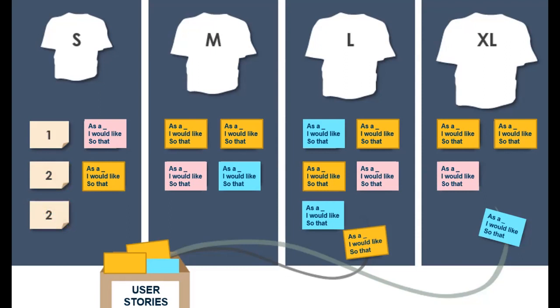We take them away from view just so that we can focus on the estimating and do it extremely quick. All right. Now you've got an idea of how this is done in the world of Agile, because when all is said and done, you get to the point where you know how many story points you're planning to get done. You would already have had an idea of your velocity if the project has already started. If this is your first sprint, well, from this data, you begin to understand what your velocity is across time.